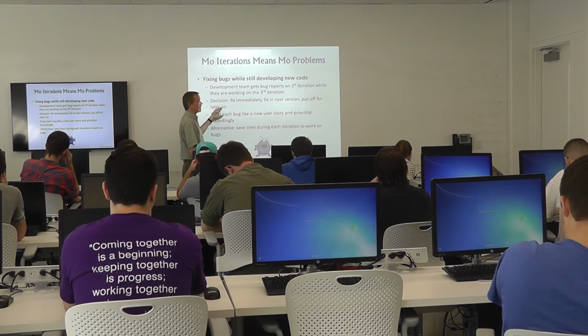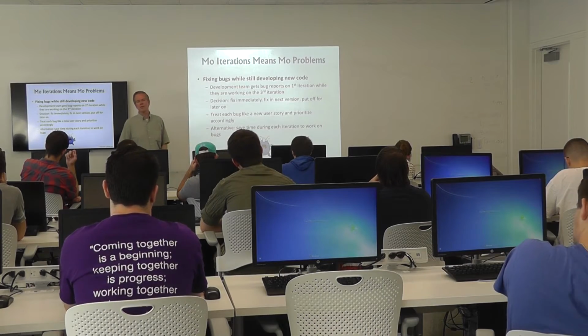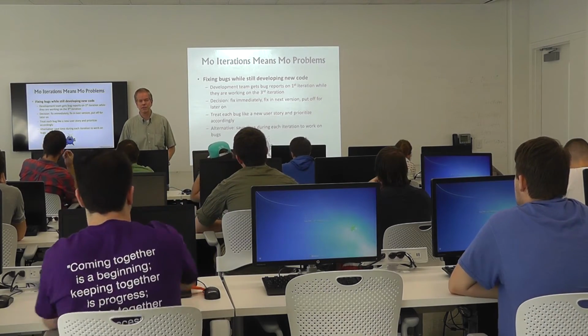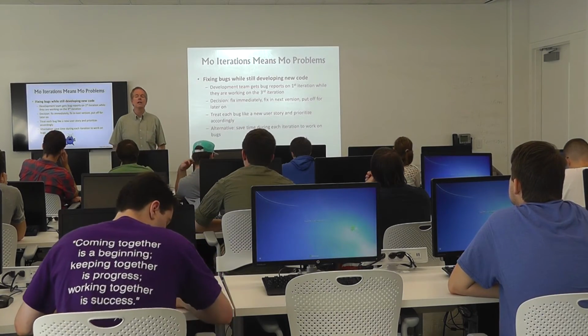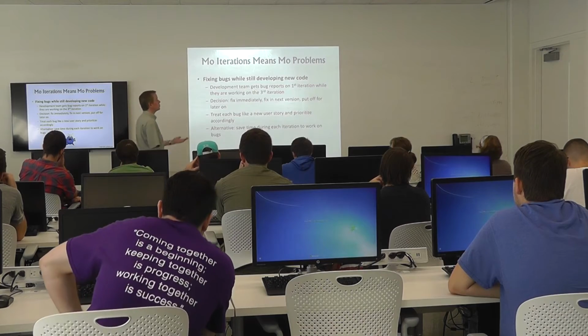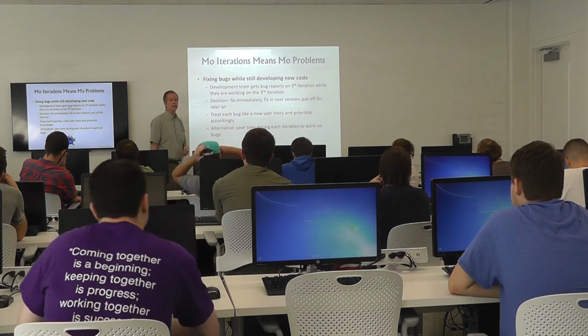Or are we going to put it off for later on? Yeah, it's a problem, but nobody's ever going to do that. Okay, that's not very common. I don't think that's going to be a big deal whatsoever. We'll fix it someday. Got it. You feed each bug like a new user story, makes sense, okay, and then prioritize it accordingly.